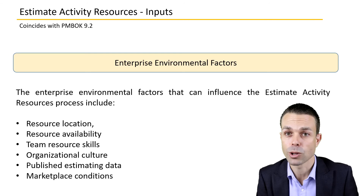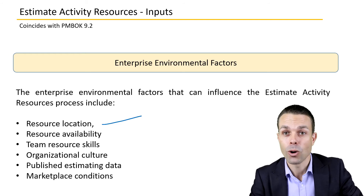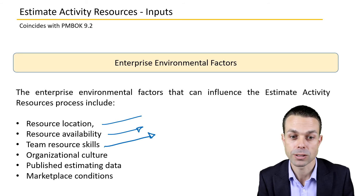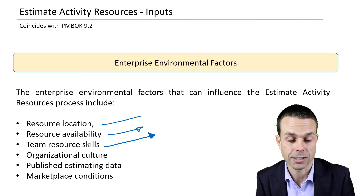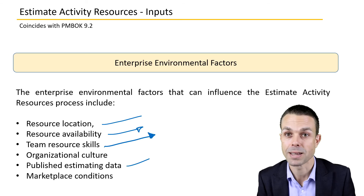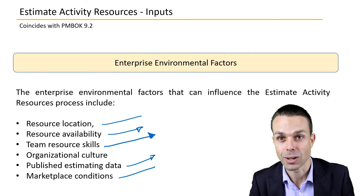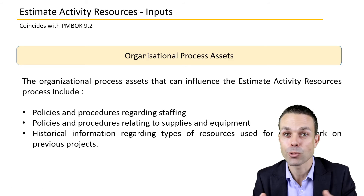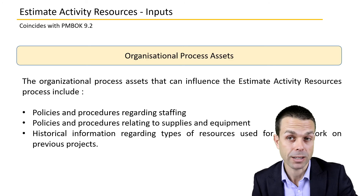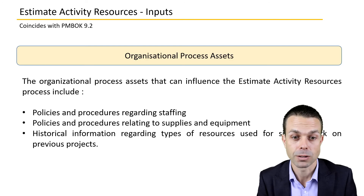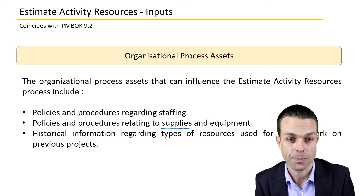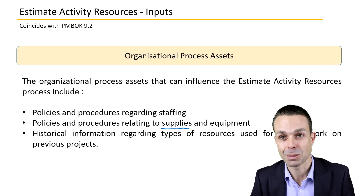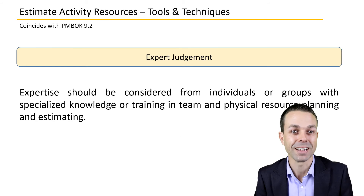Enterprise environmental factors include resource location and geographic distribution — whether the team is dispersed or co-located — team resource skills and general skill sets within the organization, published estimating data, and general marketplace conditions. Organizational process assets include staffing policies for onboarding or acquiring external staff, processes for supplies and equipment, and historical information on resource types used in similar past projects.